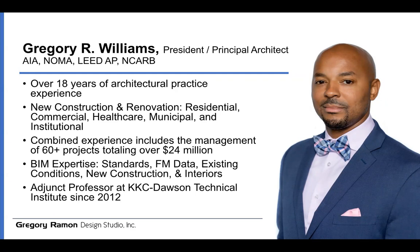Sometimes we do that on projects as well. But I would say 3 to 4 weeks, and that really is inclusive of conversations with the client or the owner about the project. And it really depends on the speed at which the communication happens too, right? Because once we give it to the client, if they take a week, then when I say 3 to 4 weeks, I mean 3 to 4 weeks of that project being in the architect's lap, not out for review or other things.